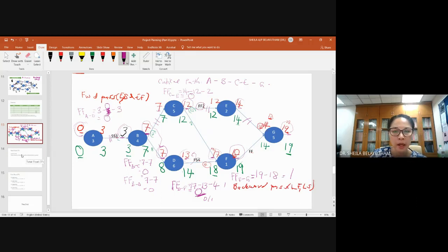So in general, how we can conclude this: you have activities that start from activity A and end at activity G, with all the relationships that you have provided here, start to start, finish to finish, lag, and so on. Your project will take 19 days to complete. If your project starts from 0, with all the relationships combined together, it will complete within the duration of 19 days.